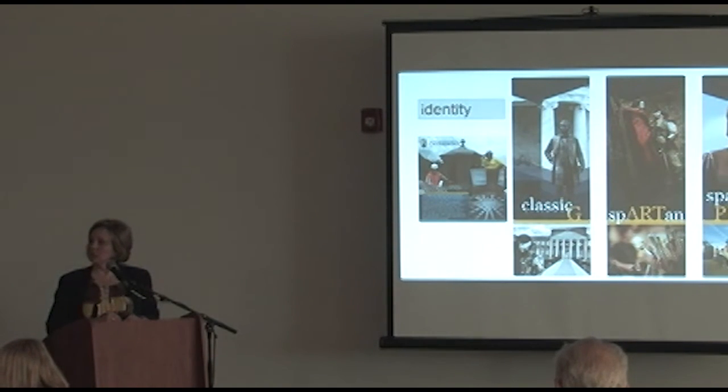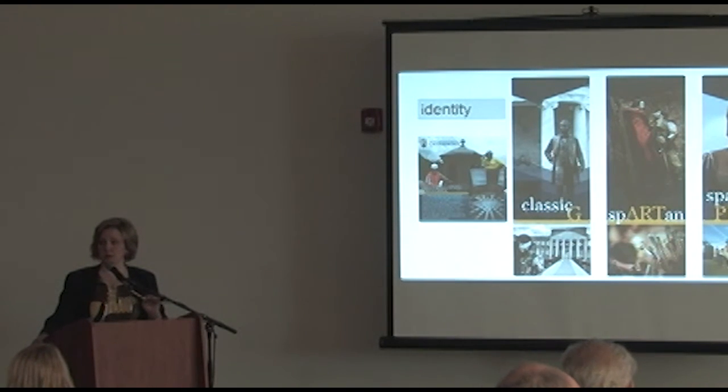It looks complicated, the structure, everything. The complication of this project was the schedule and phasing. Keeping the building up was Herculean, and they were instrumental. I don't know how you do a project under bid delivery. They were involved completely through the construction phase, managing all the trades. It was a joint venture: Rogers Builders out of Charlotte, in a joint venture with then Hardin Construction from Atlanta. They also had a local small contractor, Davis. So it was Rogers, Hardin, Davis, a double joint venture. Since then, Hardin has become part of DPR Construction.